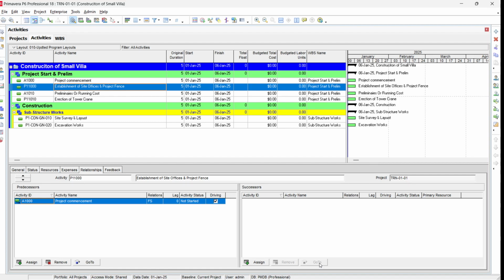We have to pay for the drainage, for cleaning. We have to hire someone for cleaning the offices. We need some office boy for serving the people. They are also coming in preliminaries. Similarly, from time to time, we need to change some electric items, a tube light finishes, or some switches are not working. So all this comes in the preliminaries. So preliminaries is called the running cost or maintenance cost during the course of the project.